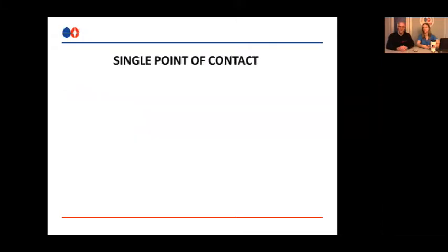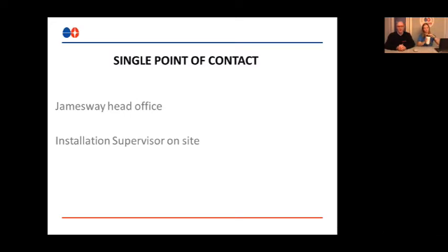Further to Tori's point, single point of contact. So generally when a project is signed, someone from the installation or service team will reach out to the customer to open a dialogue and start exchanging information about construction schedules, installation plans, needs on site, shipping details. So that can be with the customer representative, and there's also opportunities to share contact information with general contractors or different trades as well.